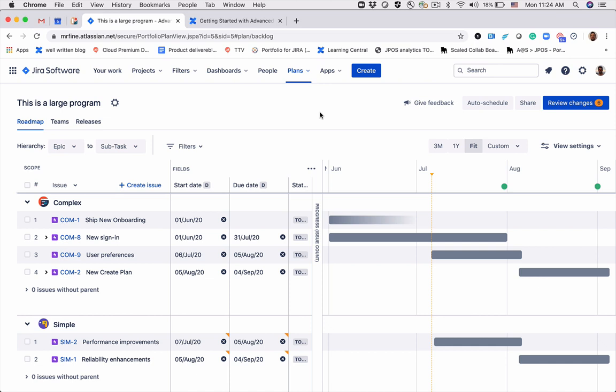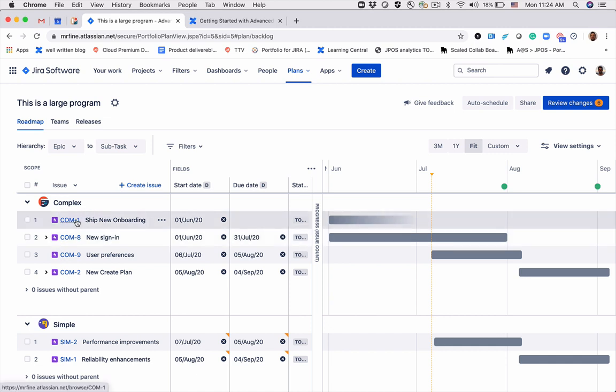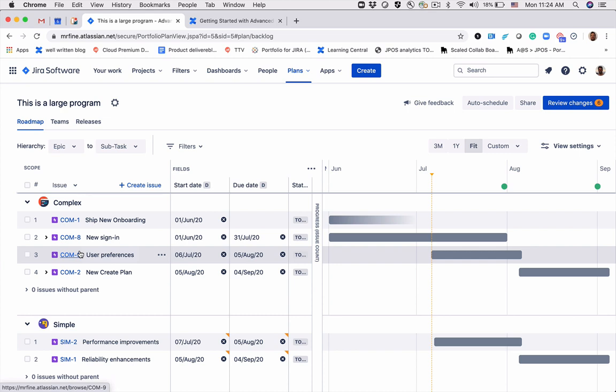This is my plan. You can see I have two projects as the issue sources. Each one has a bunch of epics. My goal is to create a new issue hierarchy level called legend, which I can link all of those epics and start tracking a higher level progress.